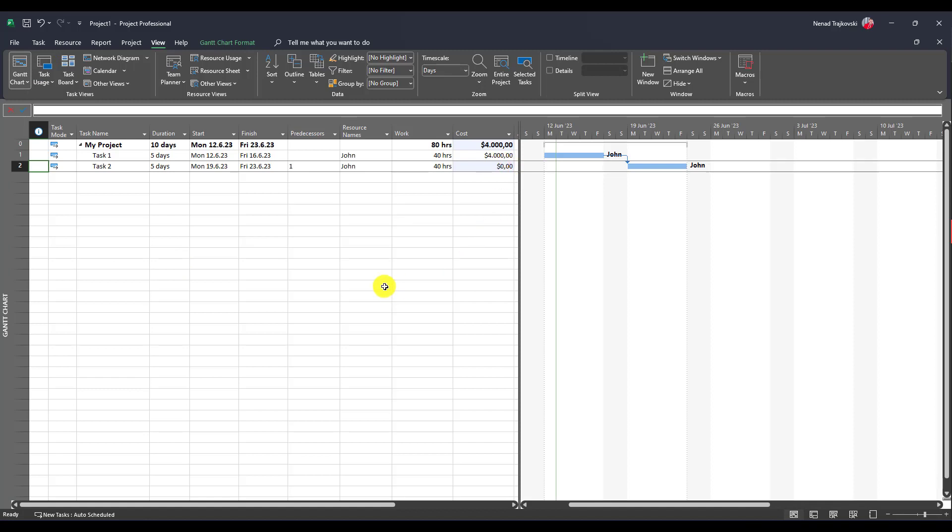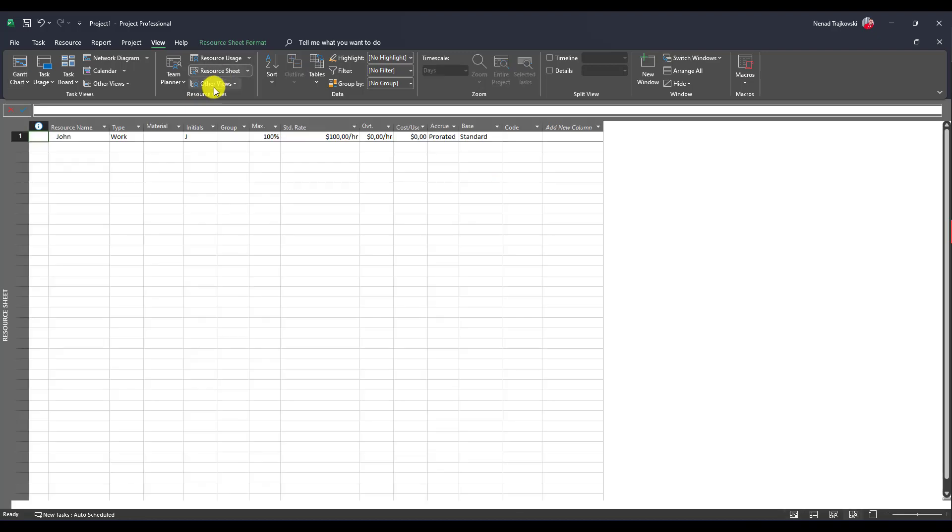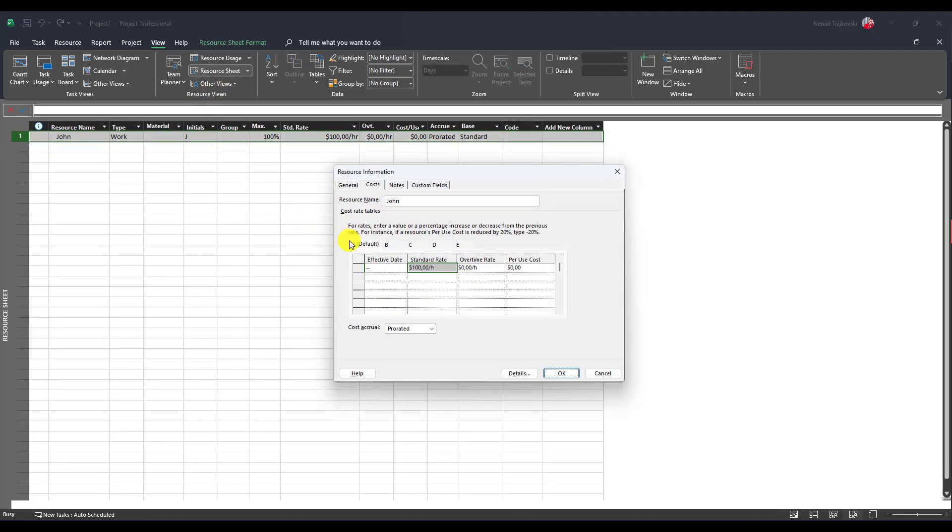cost is zero. Because 40 hours are multiplied by costs which are applied to B table or B tab or however you want to call it. And B tab here is obviously zero.